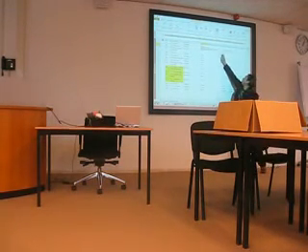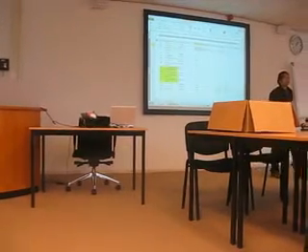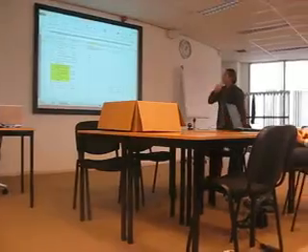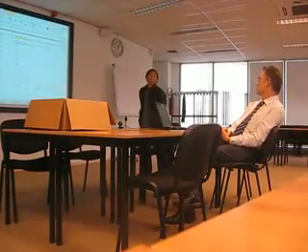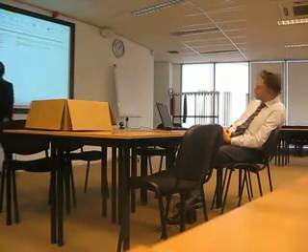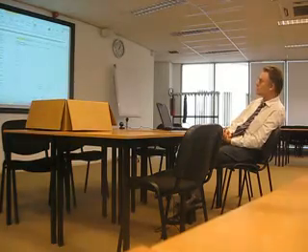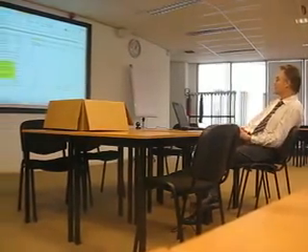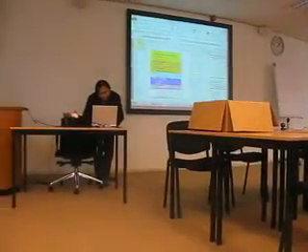This is the variable cost. You could not call it reception; you could call it additional guest. And then you put in the reception, which is an activity, and you put the guest as a resource. It's a bit strange, but it really works.